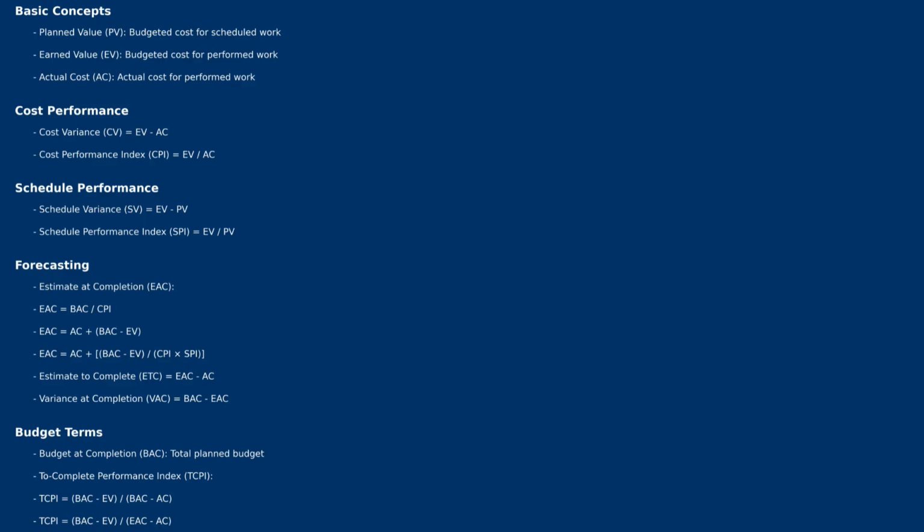When you say CPI of 1.5 and SPI of 0.90, it means you are getting $1.5 for every dollar you are putting into the project, and an SPI of 0.90 means you are progressing at 90% of the rate originally planned. This means you are good at cost because there is no problem with cost.